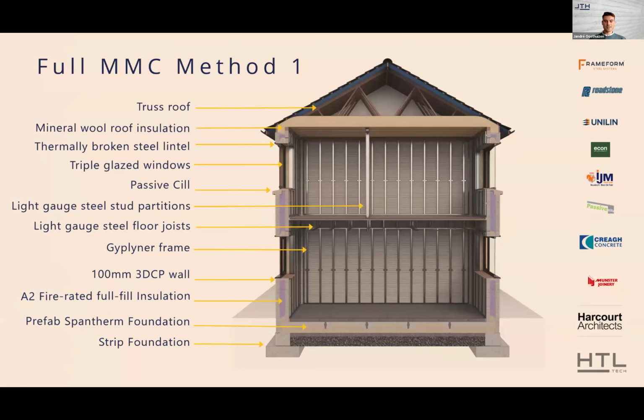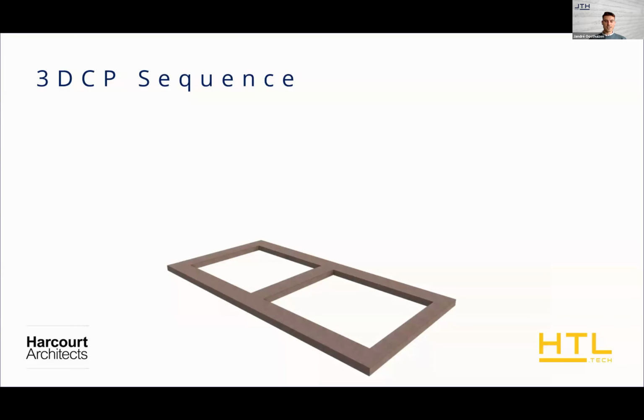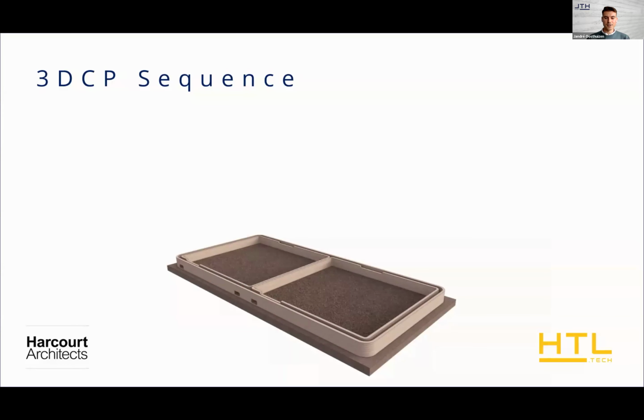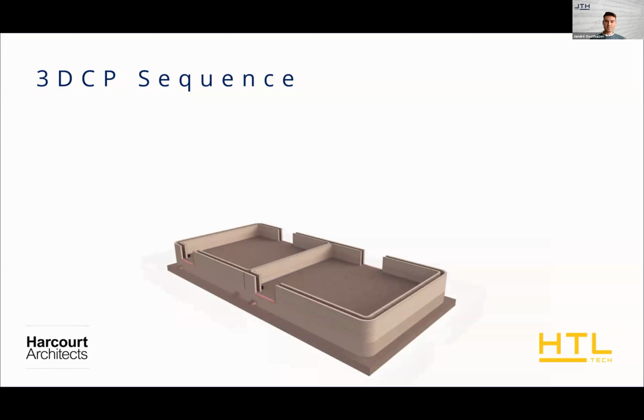And then this is just to show the new detail, which uses the prefabricated slabbing system. This can be done in two variations. It can either be done on a strip footing or a pile foundation, which obviously depends on your ground conditions. And then if we just look at the sequence of it, you'd start off either printing your rising walls or using the precast slabbing system.